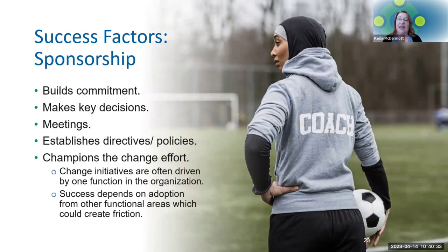Many studies have shown that having a great sponsor for your change can make all the difference between success and failure. A great sponsor builds commitment within the organization for the change. They need to be the key decision maker with the change initiative, and a visible one at that. You should hold regular sponsor meetings to assist the sponsor and ensure continued commitment. Your sponsor should establish directives and policies to meet change requirements, and should be a champion for the change effort. Change initiatives are often driven by one function in the organization, but success of that depends on adoption from other areas within the organization. So successful change initiatives are sponsored by active, visible, cross-functional leaders.